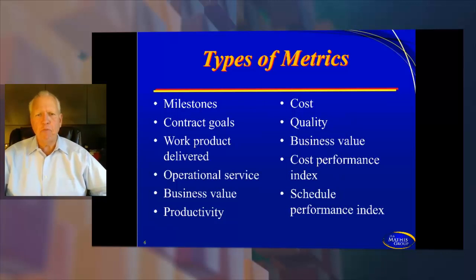So CPI and SPI, in a nutshell, here's what that is. It's showing the cost efficiency. It's showing the schedule efficiency of what's been accomplished compared to what was planned. So in the SPI and CPI, it's going to be a percentage, and 1.00 is going to be perfect. If you're below 1, that's going to be bad. Not horrible, obviously, in some cases, but bad. So let's say we had a 0.85 on our schedule. That means I'm 15% behind schedule. If I have a 1.05 schedule, that means I'm 5% ahead.